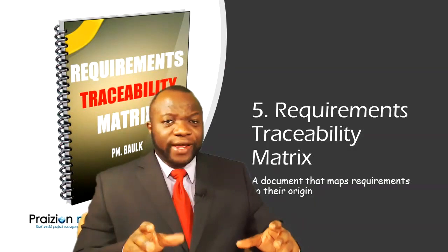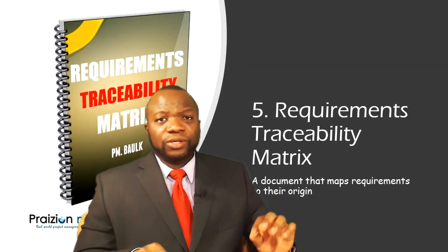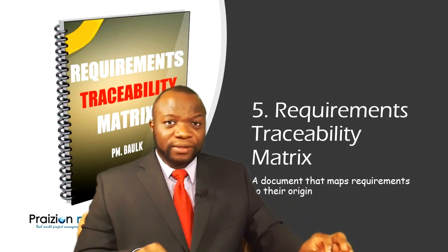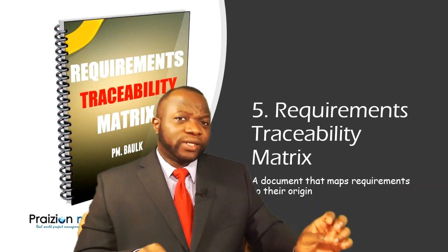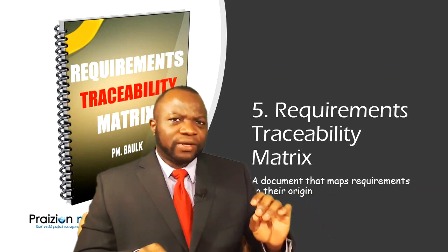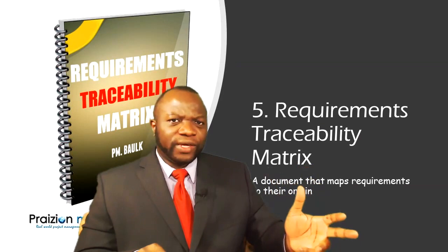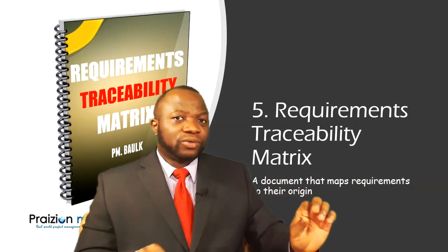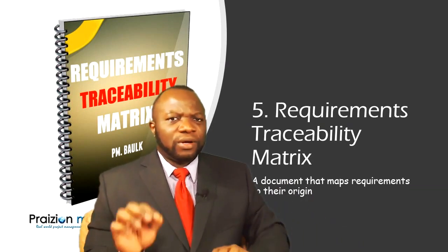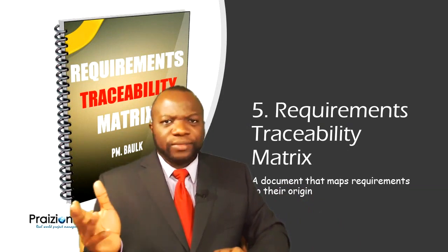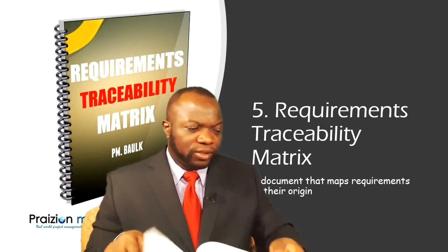It could also be used to track, as I used it, requirement to use case, priceless. Requirement to test script, even better. Because as we began to test the software, we were able to link each requester of a requirement to that specific test. We got them to test their requirements, and we had another field that tracked the requester to a signature, electronic or otherwise, to signify that they had signed off on those deliverables. Awesome tool. Well, output, to be PMBOK compliant. Now, let's take a look at that particular section in the PMBOK guide.